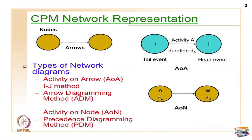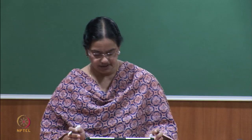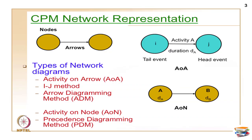In the activity on arrow diagram, activities are represented along the arrows, as the name implies. Events are represented along the nodes, and activities are along the arrows. Activity A is represented here, with I as the tail event and J as the head event. In AON, as the name implies, activities are on the nodes, and the arrow marks generally show the relationships between two activities.